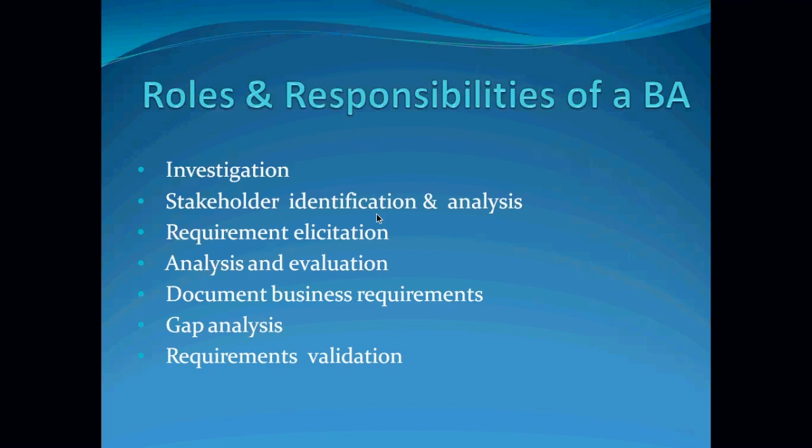You incorporate the comments into the document and say, I've updated this with your comments. Then once you send it back to them again, they validate the requirements and say, okay, everything is now correct. Then you can request for sign off, saying, can you sign off? These are the requirements that you actually requested.